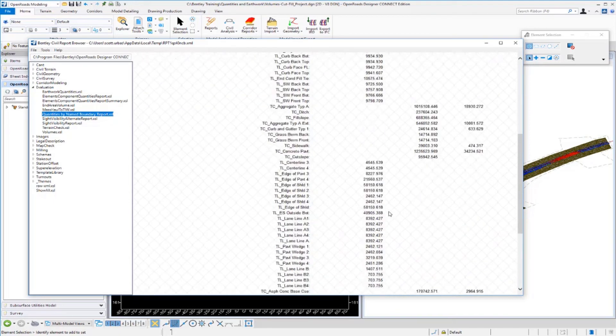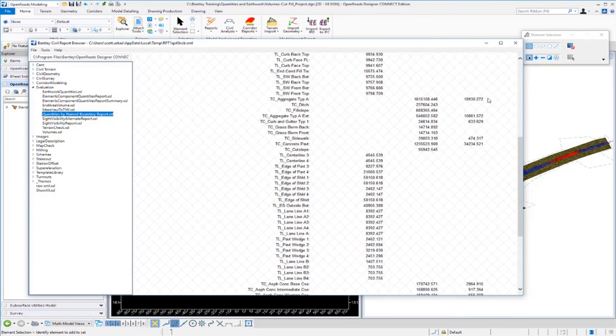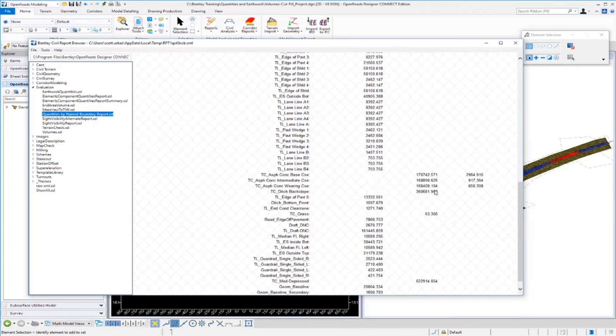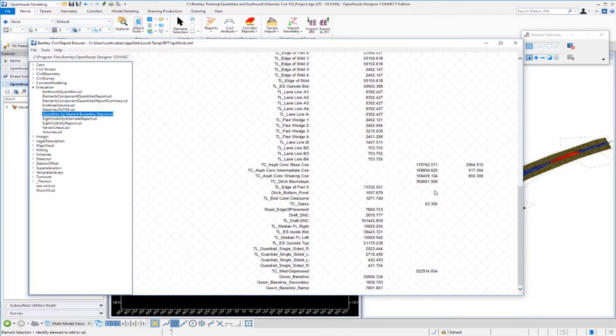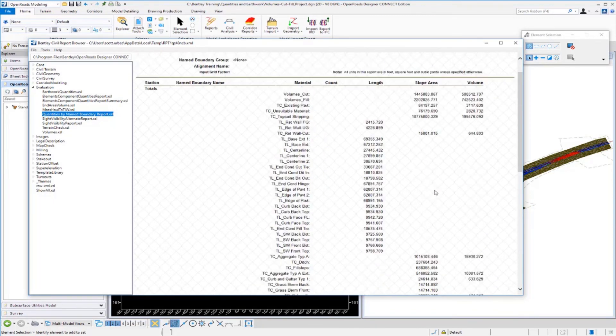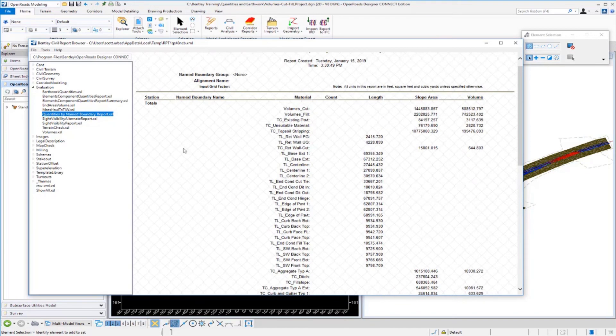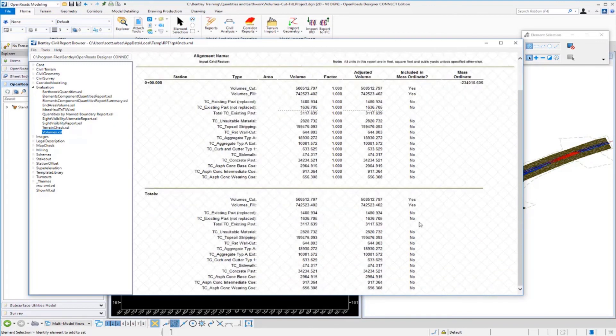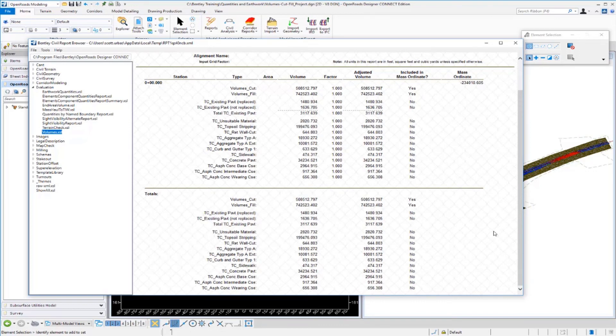If you scroll down you can see we have our volume for our aggregate and our curb and gutter. We have all these useful quantities that we're generating or extracting from the 3D model. Now if you want to get a different look at this we can come over to our volume style sheet here, volumes.xsl. And you can see the pavement split here and you can also see a different type of report. So that's how we can get the total quantities for all of our various materials on the project.